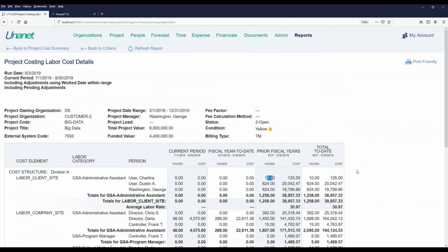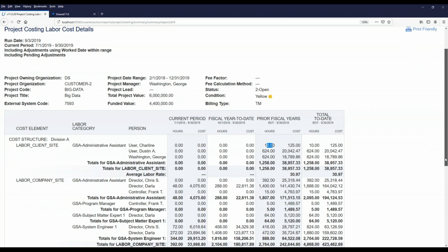All right, pretty powerful. This is really a sea change for us compared to my last company, because it let my project managers monitor something. One of their primary jobs was to ensure people were not charging to overhead projects when they weren't supposed to, because in our old environment, they would only be able to track that down once the books had been closed for the month. By then, if someone had been misallocating time for the whole month, we had a real problem. We were in the hole on overhead. In the Unanet environment, if someone started to put something somewhere it didn't belong, they saw it as it happened and could cut it off before it had a chance to gather steam. All right.